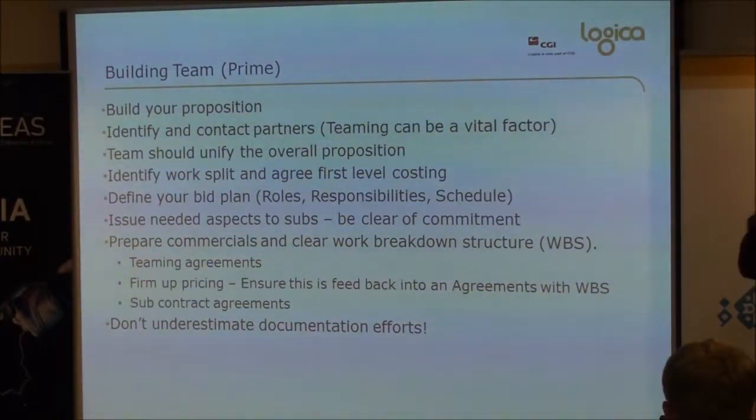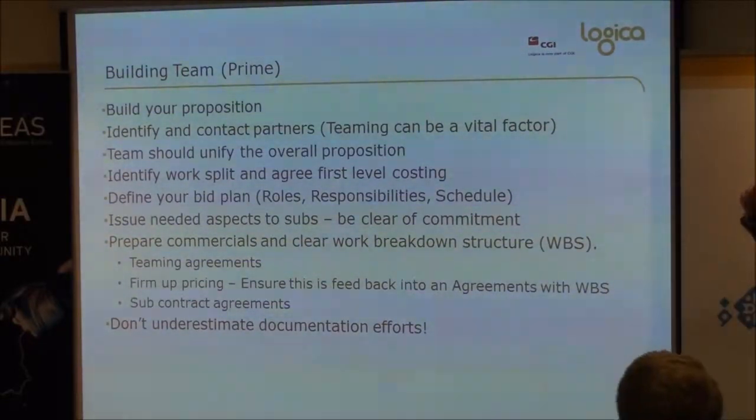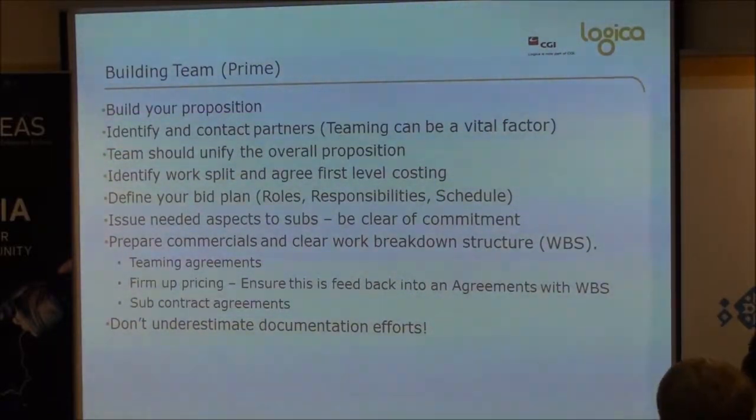So there'll be more or less a tick box. If it's a prototype, we just need these documents. But if it's an operational system, that list can be very, very long and will take considerable effort. So just be wary of the output documents. They'll be clear in the statement of work what output documents they want, and think about them. And also how you'll divide those, particularly if they're shared documents between you and a subcontractor.